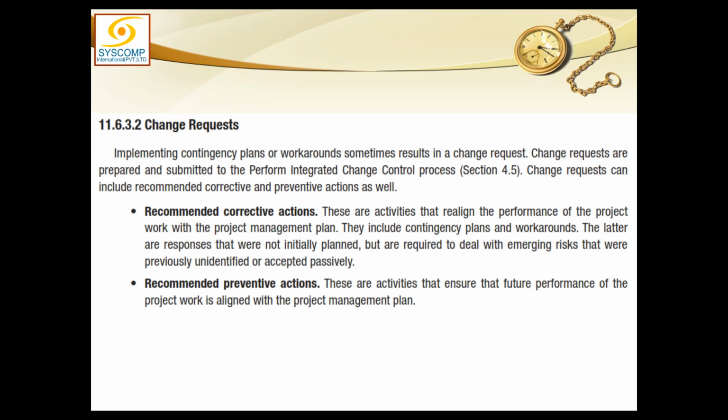As far as the change request is concerned, a change request will result in these two actions. Some of the actions could be corrective actions. These corrective actions are recommended with the change request, and those corrective actions address something which is going wrong and how to correct it.